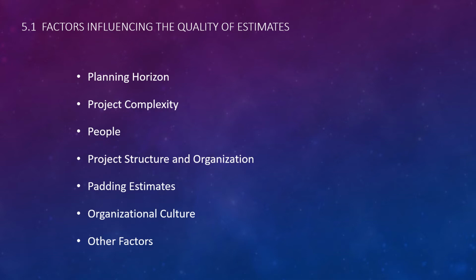I've said it before, I'll say it again. COVID happened and everybody kind of had to change how they were doing things. So if you had certain projects going on, now maybe you need all new PPE, maybe you had a delay in when people could do things for you, so now your timing is completely off, or how they could do them, or the resources that they needed were on site, so we had to put it on hold, but we were leasing those resources and we still have to pay, so now we have to extend it, and maybe there's penalties for that. So there could be lots of factors that affect how the quality of an estimate happens versus the reality.